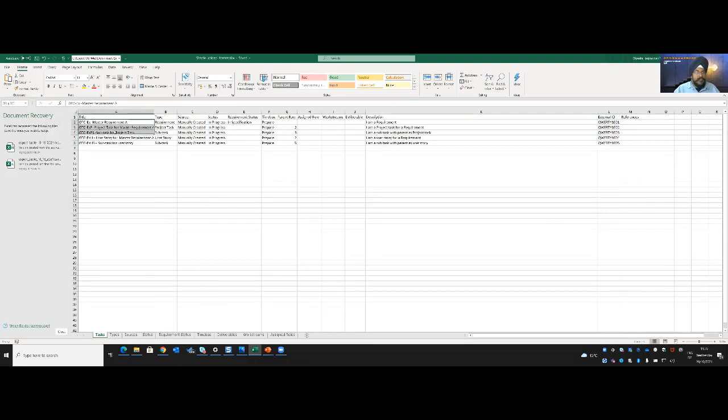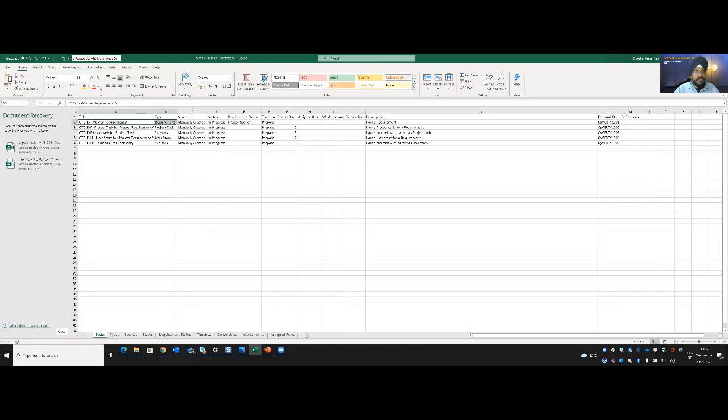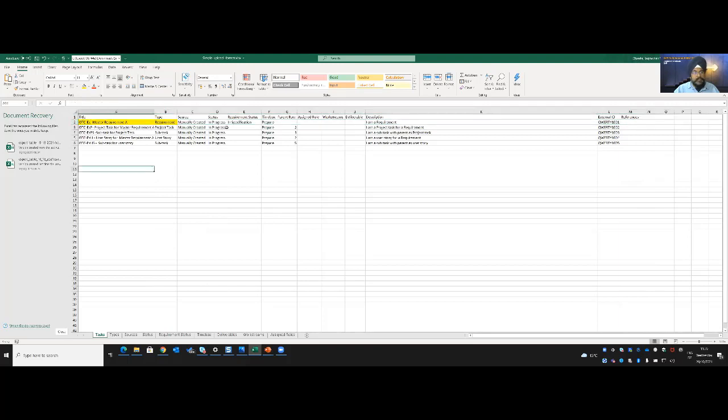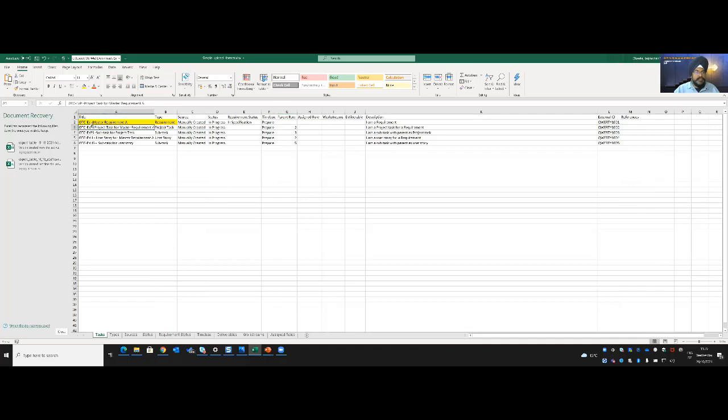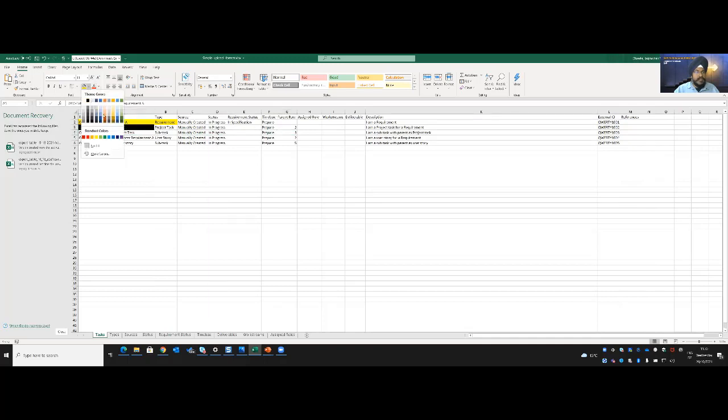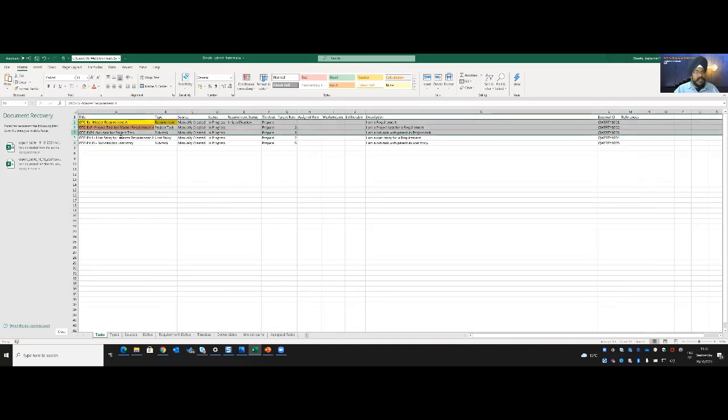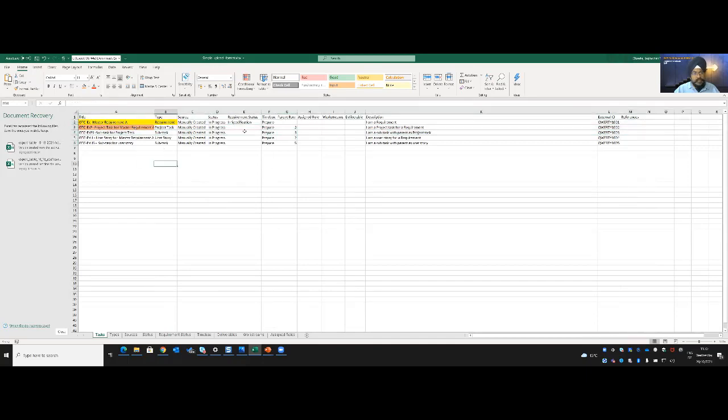Relations also work very easily. You really drag and drop, and that's how you can model the relations. It's really efficient. That means you first of all have a visual way to see your requirements. You have an easy way to express your dependencies. But that still is a lot of work. I'm not denying that it's something that doesn't take time or doesn't need effort. For this reason, we actually help you with an upload format. Let's look at this upload format. I have five entities. One of them is the parent of everything - it's the requirement. Please note carefully, this has the row number two. When I upload this Excel sheet, I have a project task which is marked to parent number two. That means this will become a child of this row. Then I have a subtask which has row number three. That means as far as the subtask is concerned, the parent is a project task.